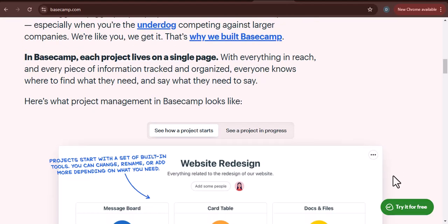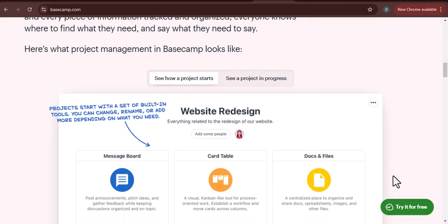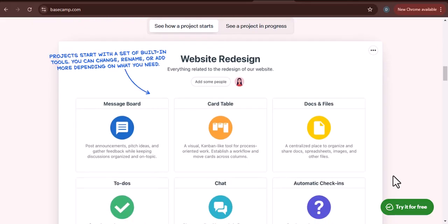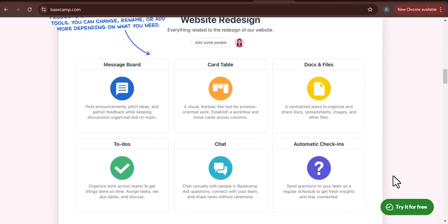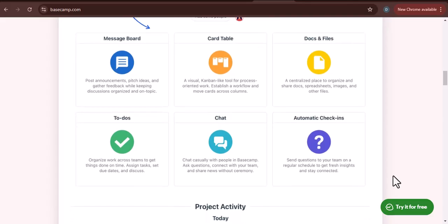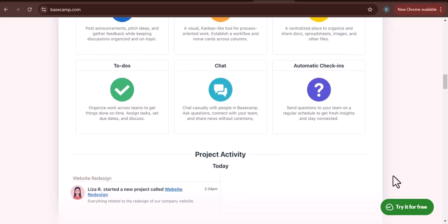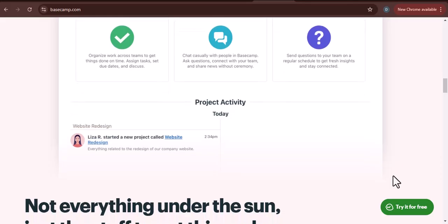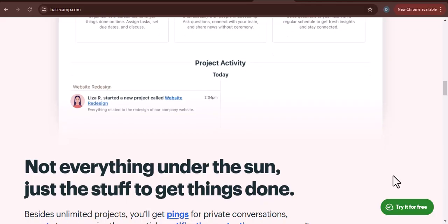One of the primary ways Basecamp users simulate forms or collect specific information is by leveraging its existing features. To-dos. For simple data points or requests, a to-do list can act as a rudimentary form. You can create a to-do for each piece of information you need, assign it to the relevant person, and have them fill in the details in the description or comments. For example, a client onboarding checklist might have to-dos like client name in description, project scope, add details in comments, key contact email as assignee. While effective for simple internal data, this approach lacks validation, structure, and easy reporting.